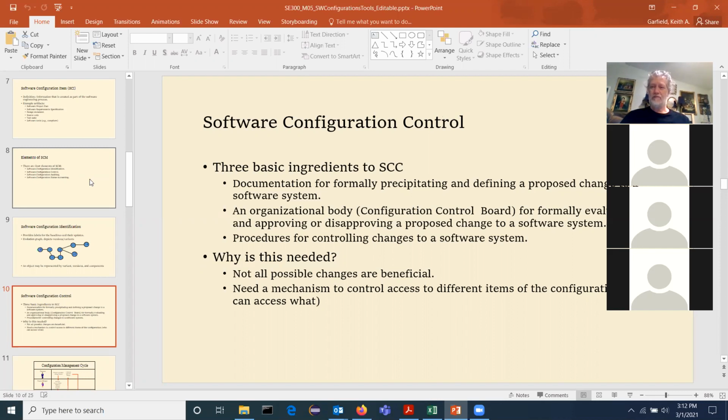Wouldn't that be like sprint, when we select our sprint goals? Right. So you have a configuration control mechanism, which is your sprint planning meeting. At the end of that meeting, everybody on the team ideally has the exact same understanding of what parts of the software are going to be changed and the goals for what parts will be completed by the end of the sprint. The specifics of how we get down to the individual developers may vary, but the fact that you're planning on moving your software forward in a very specific way, that's your control mechanism.